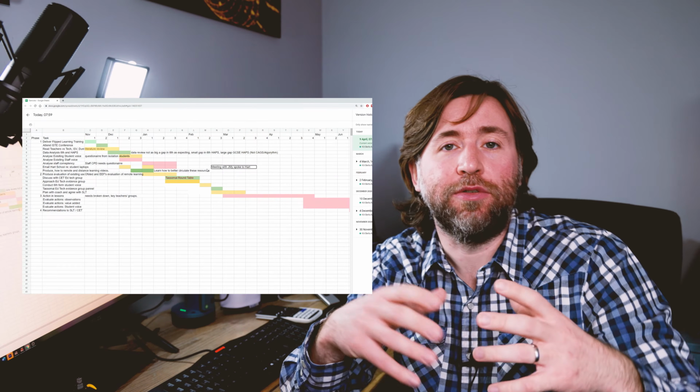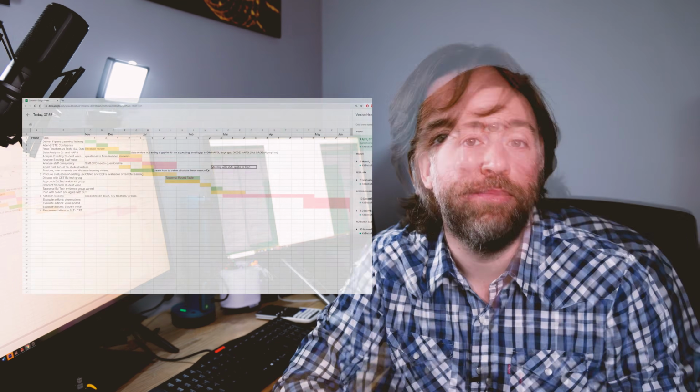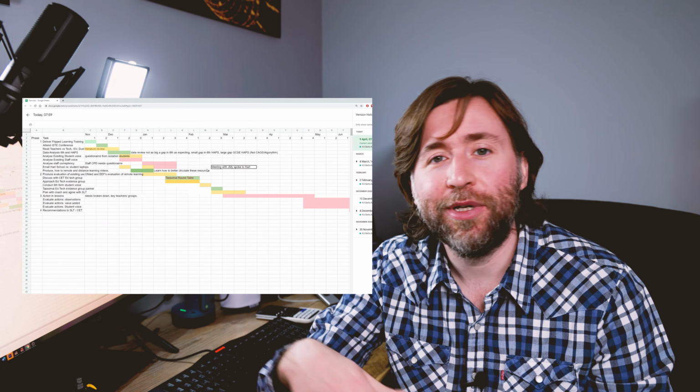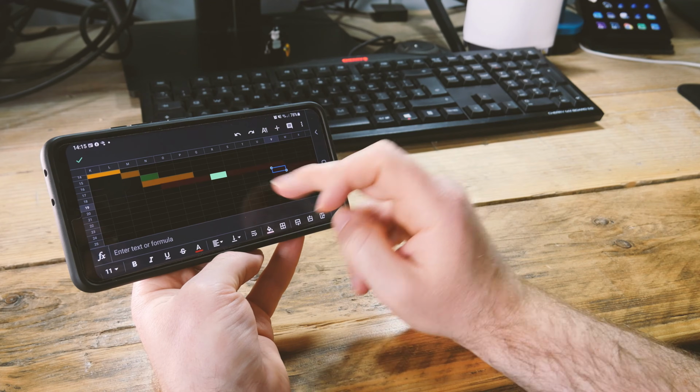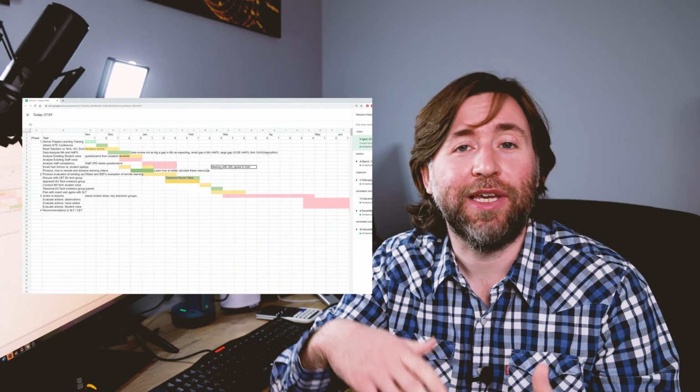Gantt charts are suited to one big idea which develops over time, but they can still be used really effectively by teams. I like to first think about the different phases of the project and then break down each phase by task. You can see sometimes I've moved things back a bit or things forward a bit, and that's okay because having a plan is about being able to change it as you go. Having a plan lets you change your plan.